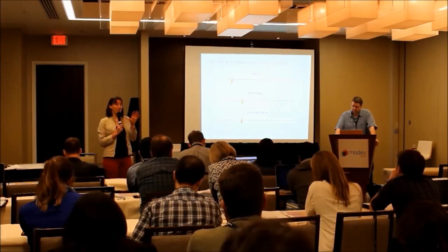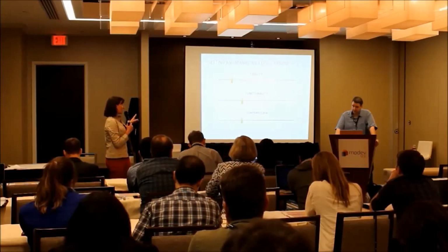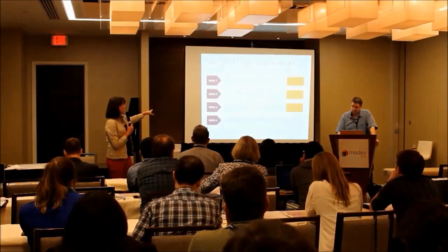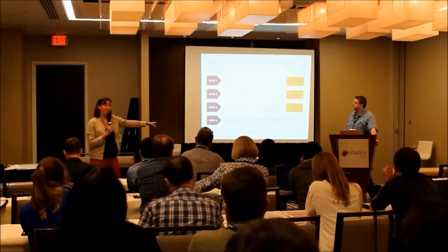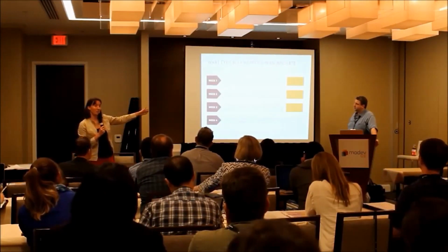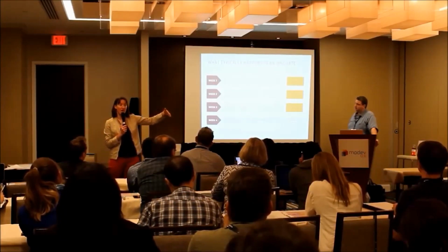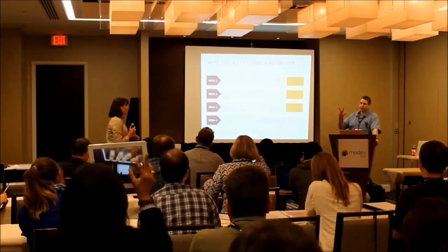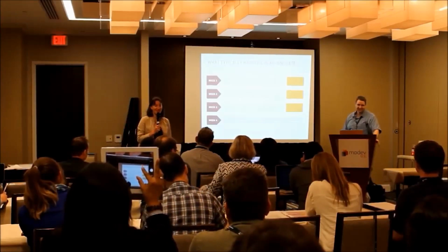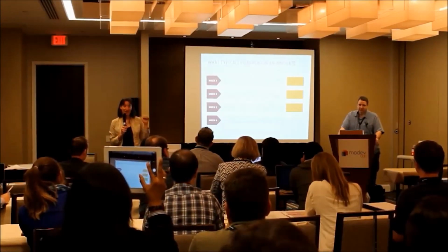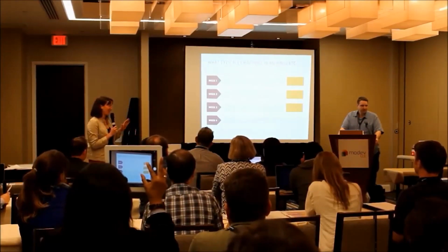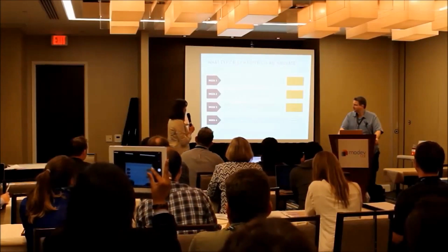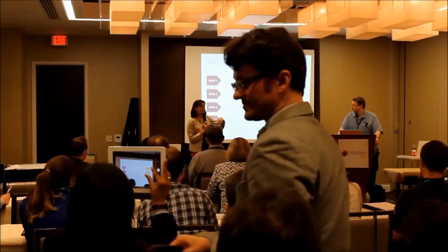I'm going to take a pause. In these last 2 slides, we showed you a lot of process stuff. Can we go back up, one more, there we go. This one is really how our process works. Typically we plan on Mondays, we demo on Wednesday, we test on Friday. So for developers, that's basically a 3-day sprint. Yeah, it's a 3-day sprint with a pushy product manager and designer hybrid who's just a pain. Oh wait, that's me. If you can't see it from back there, we'll put these on SlideShare.